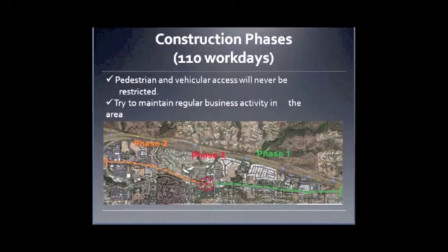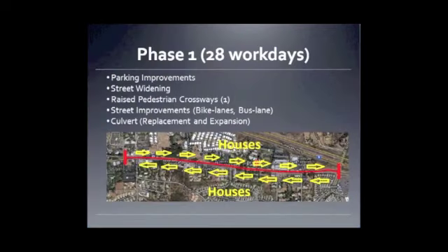During school hours, the construction crew will monitor pedestrian crossings for students and school staff at all times. Similarly, the construction group will provide pedestrian and traffic monitoring during the operation of any type of equipment, either light or heavy. Phase 1 is going to require 28 work days.